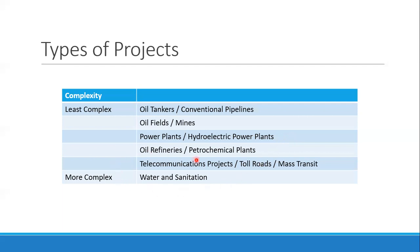Some of the most complex types of project financing are telecom projects, toll roads, mass transit, and water and sanitation projects. The main reason is that the output of these projects is usually not sold to just one customer — it's sold to the public. For toll roads, revenue comes from the number of vehicles using the road. There is one risk very prevalent in telecoms and water: demand risk.